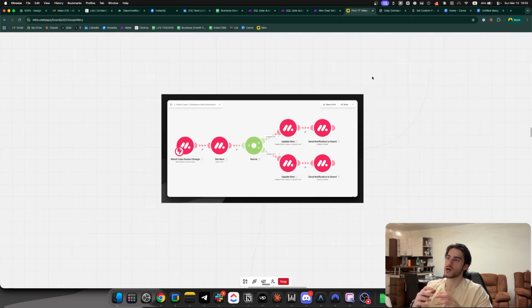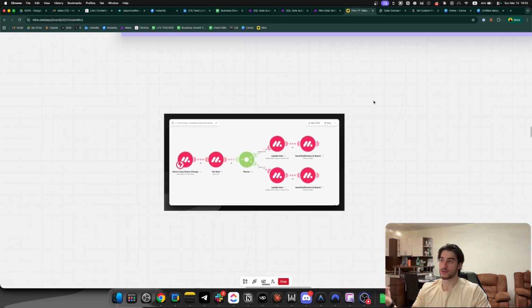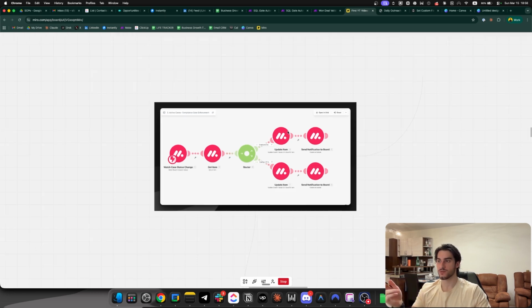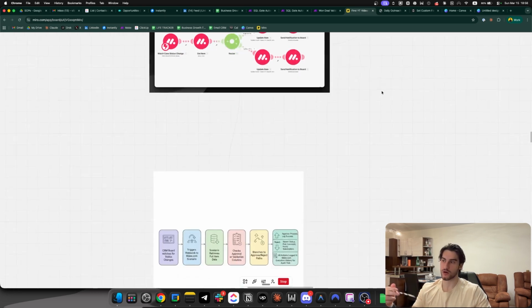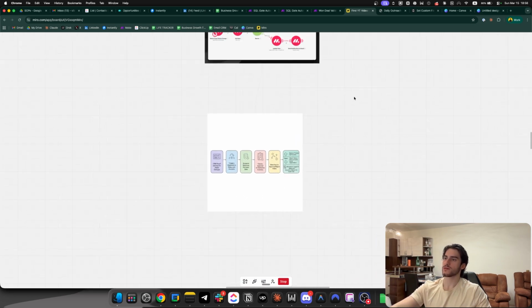So how we set this up is you have the stage column, which is the main column which we use to monitor the different statuses and how the case is progressing. And then we also have compliance gate number one and final approval, which also need to be marked as approved if we want to move to a specific status. So if we have a status that is set for compliance gate 1 and it wants to pass to the following status, if the compliance gate is not met, we revert it and we send a comment.